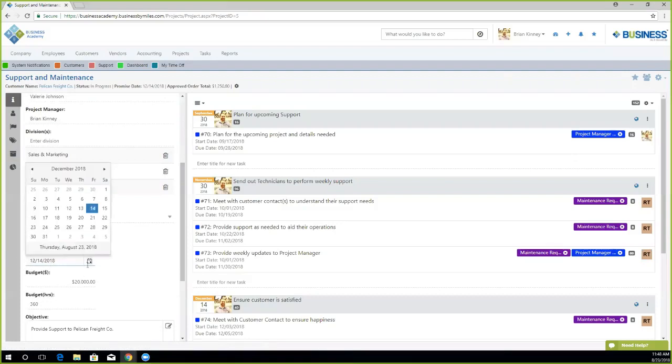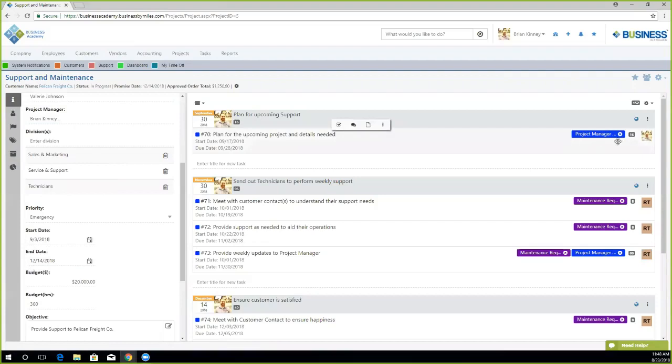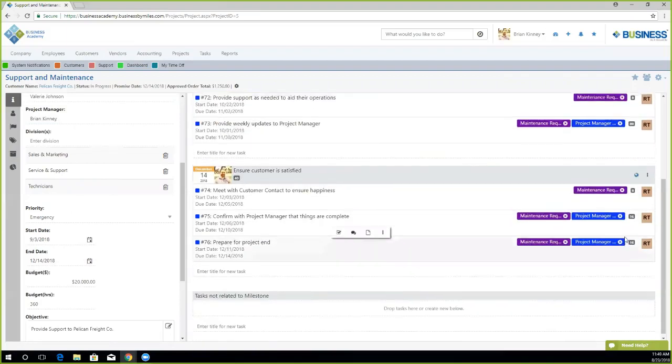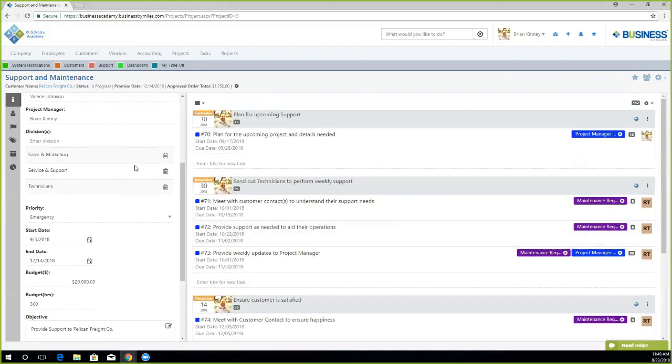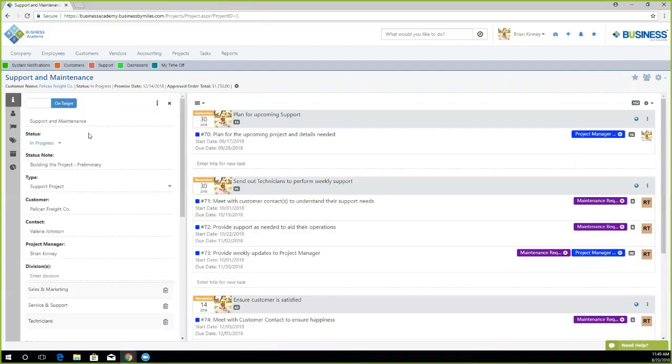So this is our end date of the project, because then it will display correctly in terms of the projected end date, in terms of the end date that we entered here. It'll also need budgets. So how much budget we have for each task that we've configured here. And thirdly, it'll need business hours for our company.